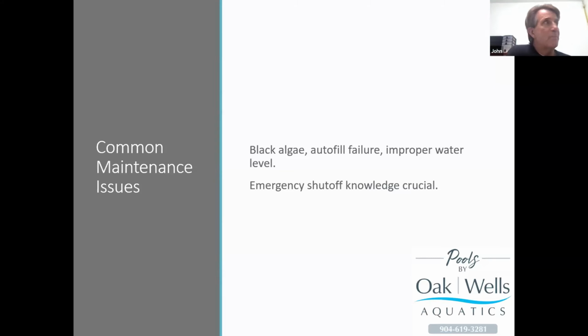But let's say, for example, a 2,500 square foot gutter pool, and let's say that the scope of work is going to be replace the water line tile, replace the step tile, replace the lights, a demo, and then reinstall new coping and refinish the swimming pool. In that case, from the time that we have a permit issued and we have all of our selections, color selections, we don't start until we have both of those, by the way, I would probably get that work done in 3 to 4 weeks. And I would tell the HOA that it's going to be 6 to 8 weeks because I want to be the hero.